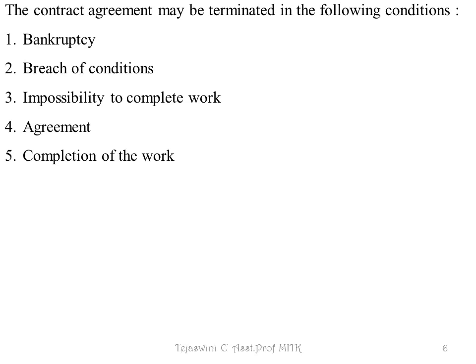If there is any kind of bankruptcy, then because of shortage of funds a person cannot complete the contract, so the contract will be terminated. Similarly, if there is any breach of condition — we already studied what breach of contract is — then the contract will also be terminated.